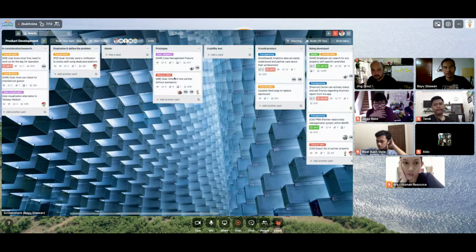And then when it's good, you go again to the idea, and then to prototype, for your first idea or the best idea. And then when you have the MVP or the prototype and it's not good enough, you go back to idea again, fix that, and go to prototype again. Maybe that's not only one time, maybe multiple times. And then after that you go to the actual test or validation, user validation step.